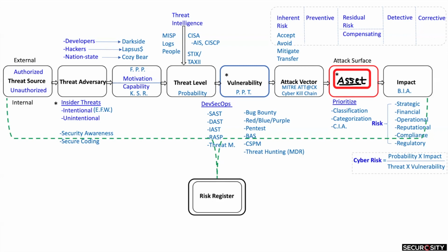The risk register should include information such as a detailed description of the risk being identified, the analysis that we conducted to measure and understand the impact to our organization, detailed risk mitigation strategies and plan, detailed strategy and plan on tracking and monitoring the risk, and finally, a detailed risk reporting plan.